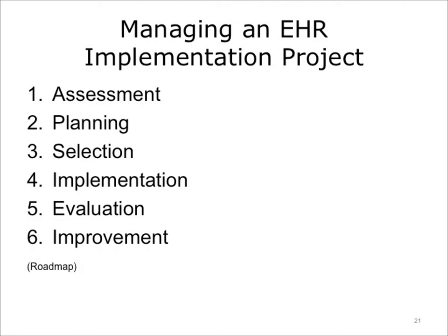Step 4. Implementation. Once the EHR selection has been made, a system implementation plan is developed with the vendor along with timelines. The implementation plan includes details on installing and configuring hardware and EHR software. A plan for migrating any old data over to the new system must also be devised, including any necessary database conversions in a manner that ensures data integrity. A staff training program is initiated and system testing follows. Then, the staff begin to use the EHR system. Throughout the process, a journal of experience and processes is maintained.